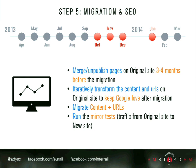And a very interesting method we were using for the testing of the migration. We actually were doing mirror testing. So all the traffic which exists for the current website was replicated to the new website. So we got actually real traffic on the new platform, which was in hide mode. With this, we detected directly all the 404 errors, all the missing elements. So while adding 301 redirects and so on, by creating extra content, we were fulfilling this gap which you usually face while doing migration.